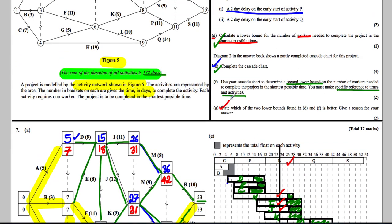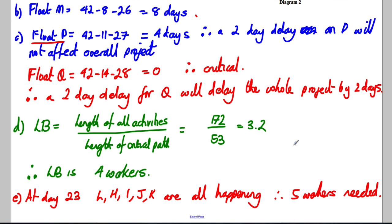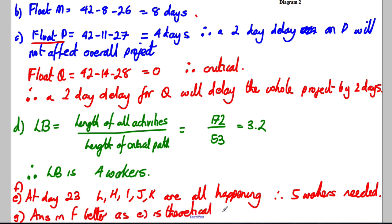For part G, state which lower bound is better. The answer in F is better: part D gives a theoretical lower bound based purely on the numbers, whereas F gives the actual lower bound based on the reality of the activity ordering in the cascade chart. The answer in F is the true lower bound.